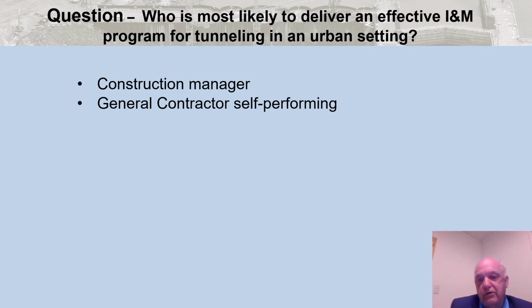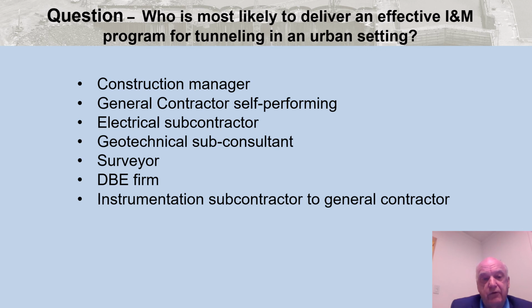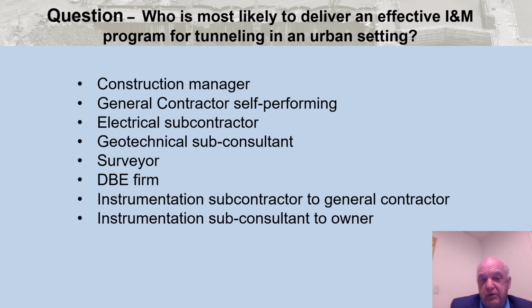The general contractor, self-performing, we see more of this happening. An electrical subcontractor, we see somebody says instruments, oh, that's an electrician, give that to him. A geotechnical sub-consultant, well, it's underground work, so let's find a local geotech consultant to do that. Surveyor, some of these instruments involve surveying, so maybe the surveyor is best positioned. We have a DBE requirement on many of these projects, so can we get this done by a DBE firm or an instrumentation subcontractor who specializes in this kind of work, working for the general contractor, or an instrumentation sub-consultant working for the owner?